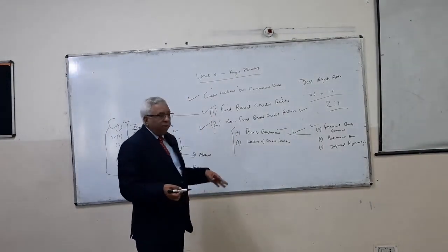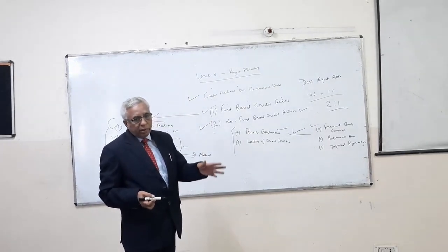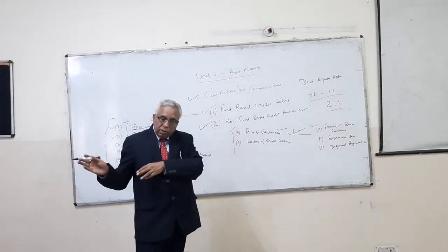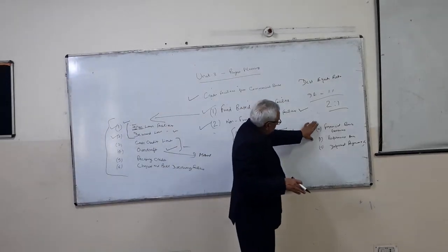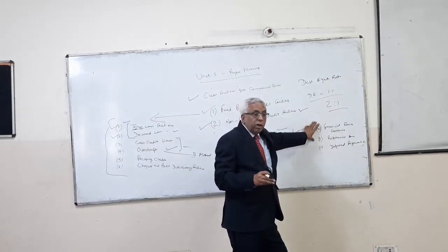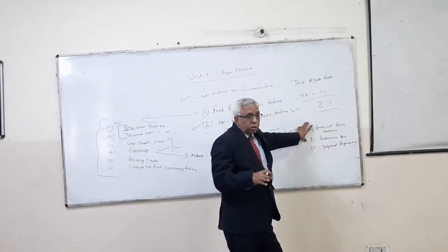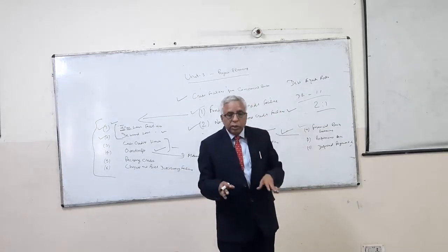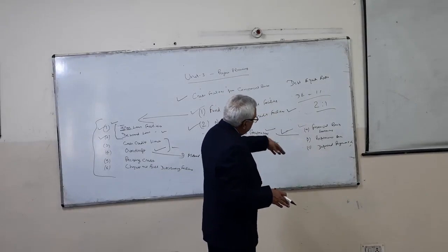In case he fails to perform to the entire satisfaction of the agencies awarding the contract, the banker will compensate them for whatever loss they suffered because the project was delayed. The banker will immediately pay without listening to his customer. The bank will not perform the contract, but will compensate on behalf of the customer and then charge the customer later on.